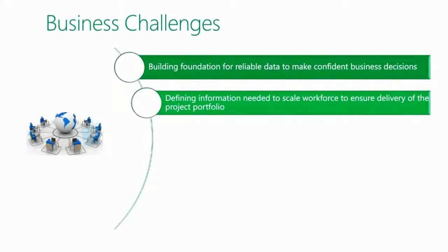The other thing we want to talk about is defining the information that's needed to scale the workforce, right? So we'll talk about capacity versus demand, and that's a big challenge. It's one that really gets the attention of the business leaders, primarily because when they ask, why do we miss our commitments, oftentimes the answer is that the resources that were scheduled to be available on the project, in fact, are not available. So that's a big deal.